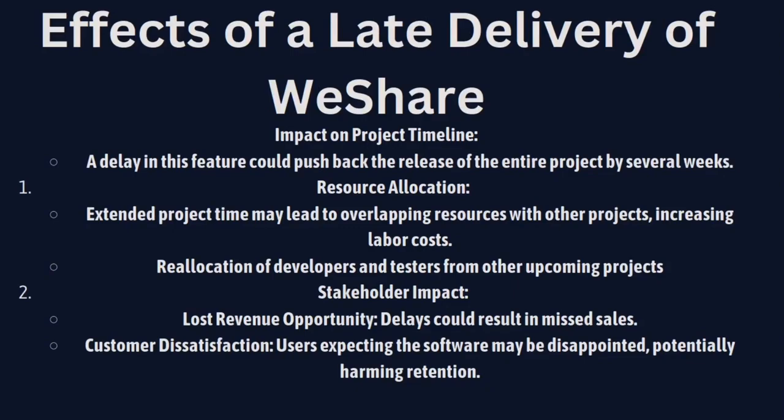Okay. So effects of a late delivery of WeShare. A delay in a feature in WeShare could push the release of the entire project by several weeks. And extended project timing leads to overlapping resources with other projects, increasing labor costs, and reallocation of developers and testers from other upcoming projects.